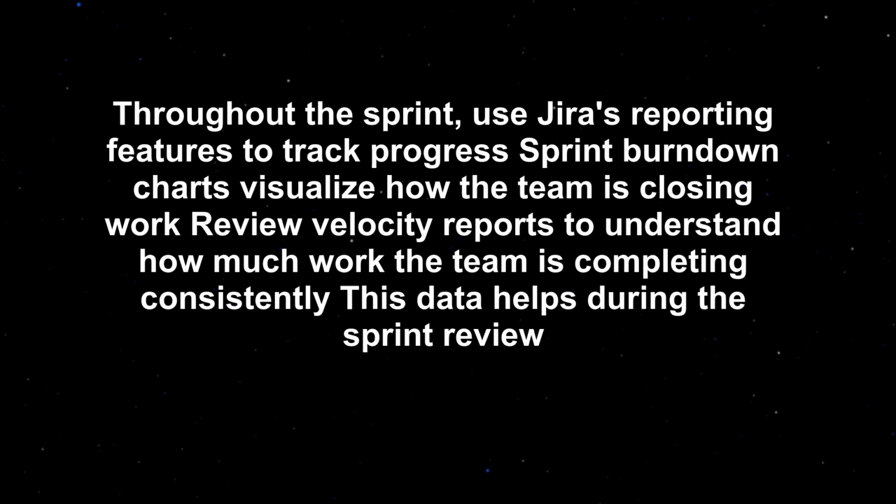Throughout the sprint, use Jira's reporting features to track progress. Sprint burndown charts visualize how the team is closing work. Review velocity reports to understand how much work the team is completing consistently. This data helps during the sprint review.